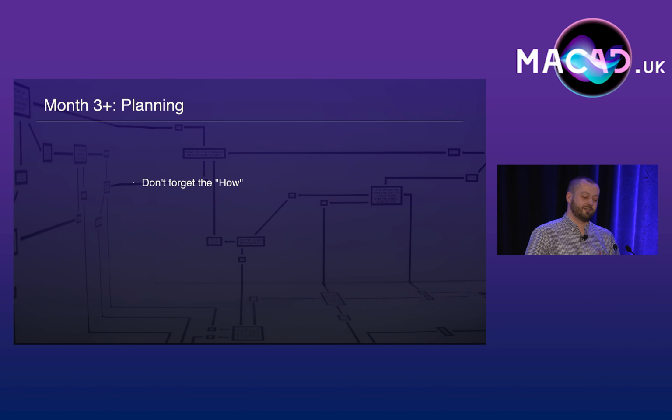For each project or task, reasonably document the steps you would take to make the change, as well as how you might roll it back should it all go wrong. Think of this as your get-out-of-jail-free card, saving time and worry should something break.